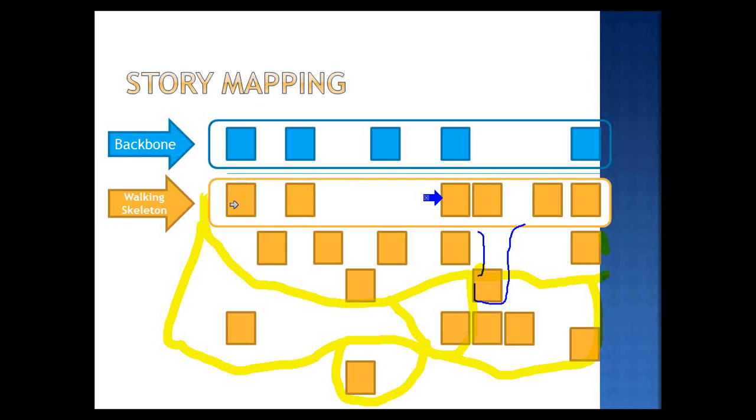And then you can also see, because you're using those stickies that way, what the work in process is that's on that map, right? You can see that, because this story is replaced with a purple sticky now, you know that that one's in process. It's being processed right now. So that's another way of using the tool.